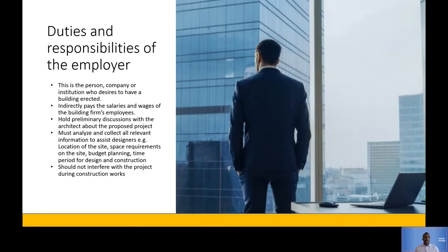Also, the employer should not interfere with the project during construction works. Once the employer has approved the building and construction actually starts, he is not supposed to go to site and stop work based on what the people on site are building.